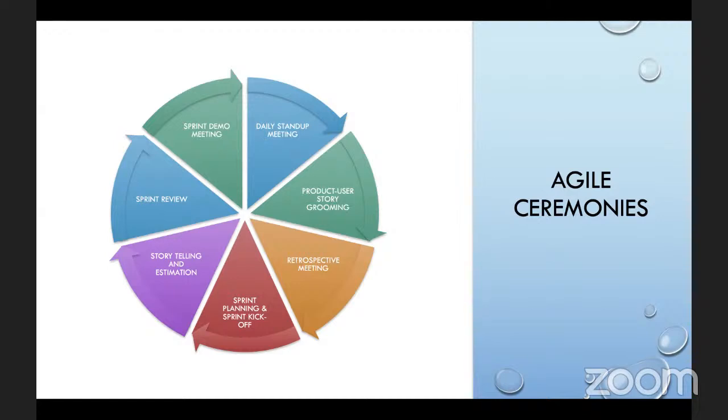So grooming of the feature is when we come together as a team, we talk about the feature, and we talk about some key things, right? Number one, we look at our current state of infrastructure. We look at our current state of architecture. We look at our overall technology stack, and then we talk about it to see if all these things I've mentioned will be able to support the direction of the product that we're trying to build. And again, we also look at the complexity of this feature, the amount of work that's required. Do we have the wherewithal? Do we have everything that we need to be able to execute this feature as well? So as a team, we need to talk about all this. That's grooming. We are grooming this feature.